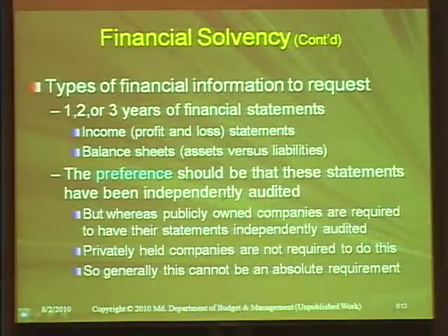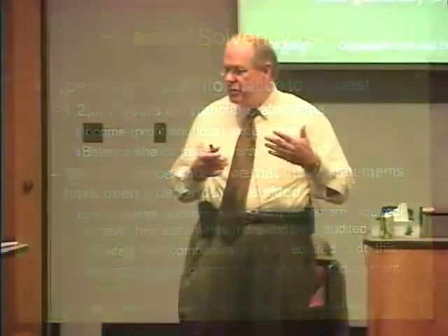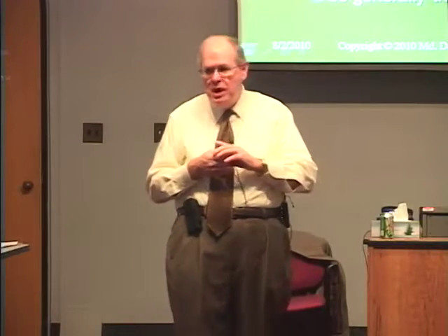Whereas publicly owned companies are required to have their statements independently audited, privately held companies are not. So if you make a requirement that categorically they must have income statements and the income statements must be independently audited, that requirement alone, which seems like a very nominal requirement, can be prohibitive to a privately held company that doesn't do that. So what we generally do is don't make that an absolute. We will say if they're a publicly held company, we want this information. If they're privately held, they should give us this if they haven't.